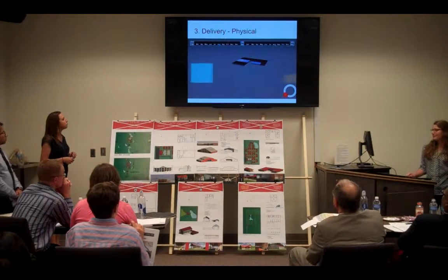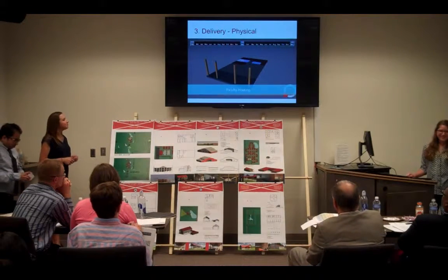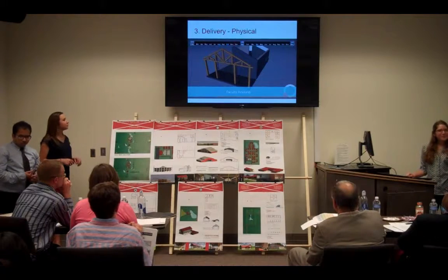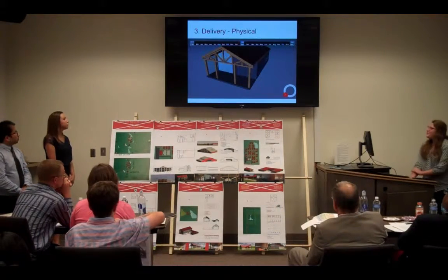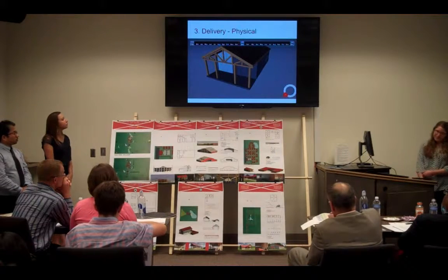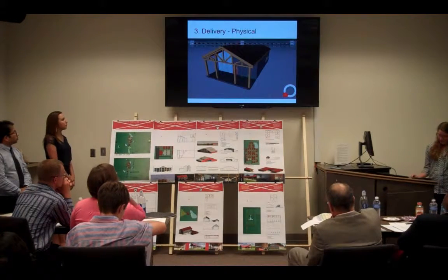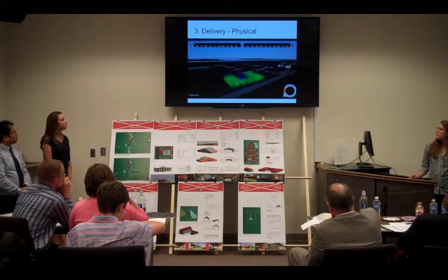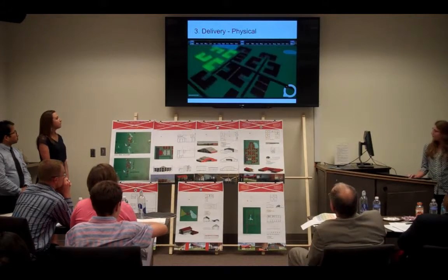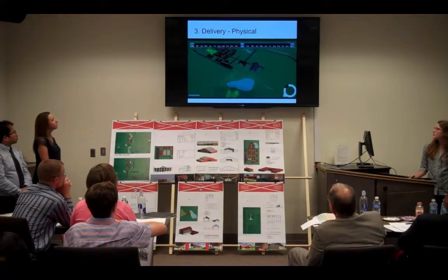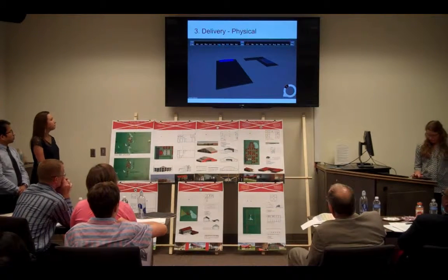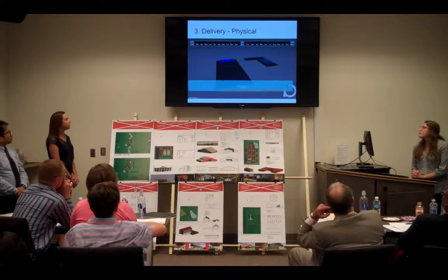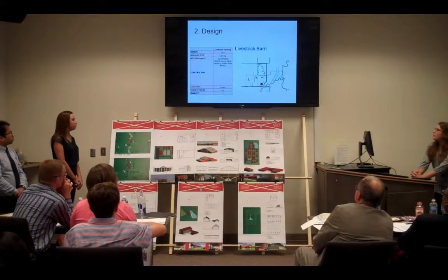The faculty housing has a total area of 1,600 square feet and takes around 4 months to construct. A single unit costs around $140,000. The chapel has a total area of 6,000 square feet and takes around 6 months.